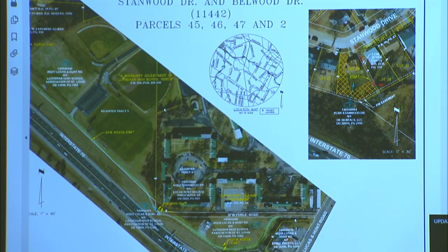If you look on the map, there's a large linear easement that is one of the easements through the Lutheran North High School. That is really our main access to get to the project because it's real tight between the houses. So there are actually 2 easements with Lutheran High School. We're working with them to try to find a least disruptive way to get to our project site. So that's where the holdup's been, trying to decide how we can get into that project.